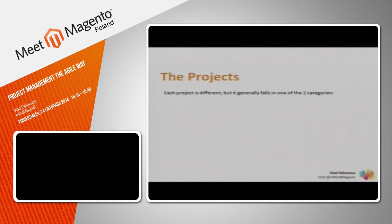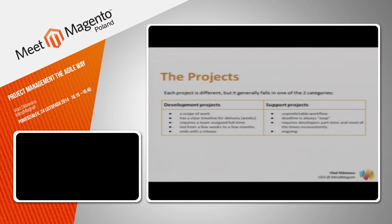So, the projects. Each project generally falls under one of these two categories: development projects and support projects. Development projects have a scope of work, they have a clear timeline in weeks or months, require a team that is fully assigned to the project, and end with a release, a final release of the project. Support projects have an unpredictable workflow. They always have the deadline ASAP, tomorrow, today, and therefore require developers part-time and not in a sustained manner. And this is an ongoing project.